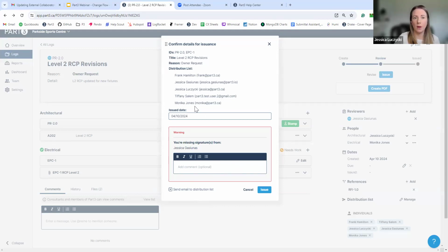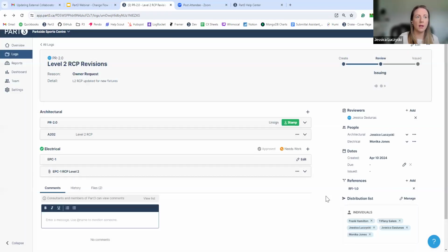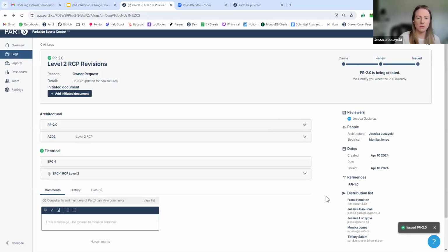And then we're going to give you that one last review. This is who it's going to, everything like that. And now I'm ready to issue the change. So now, again, Part 3 views this as you've created a change. You're sending out something to the world, to your contracting team, to say, hey, this is something we want to do, but we'd like to know how much it's going to cost before you go ahead with it.